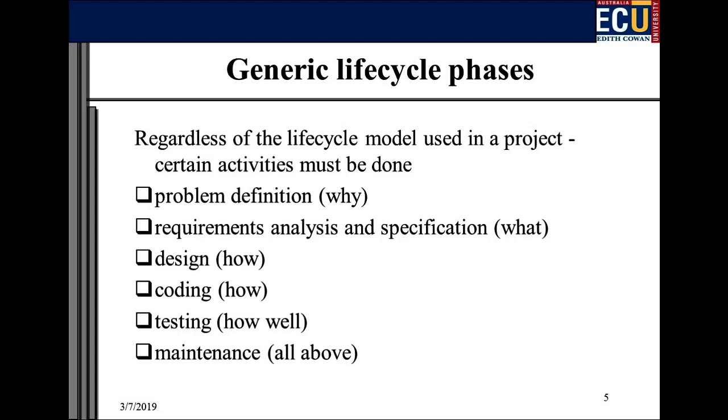And the reason why we have a design phase and a separate coding phase is that it's a lot cheaper to fix mistakes on a design than to take 100,000 lines of code and try to refactor it so it does something completely different. With a paper diagram, you throw it in the bin and you make another diagram. It's not compilable code. It's not like you make one change and it affects everything else.